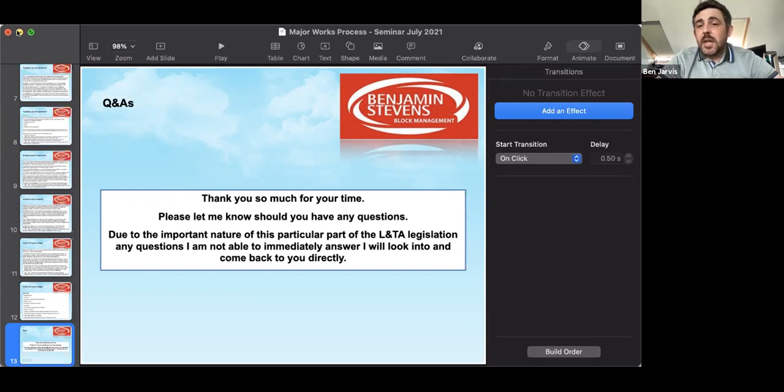And it's important obviously to note on those notices that we would ask people to pay by a certain date to make sure it doesn't then delay the works and kick that project down the road by a number of weeks. So as we've already covered, the start dates, pre-work arrangements, period of works, and as I say, that we get into the final stages of the project of making those initial payments to the contractors as agreed with the